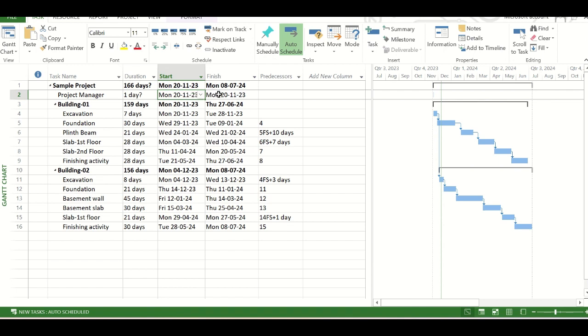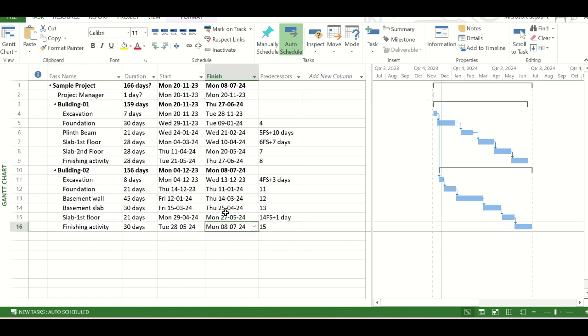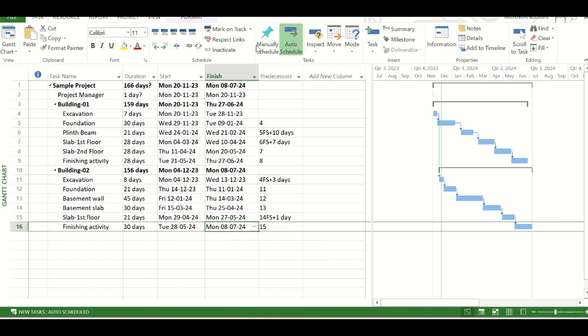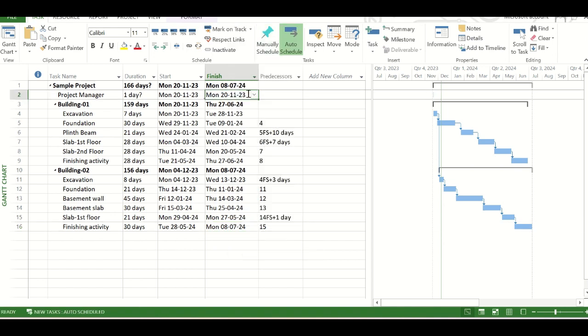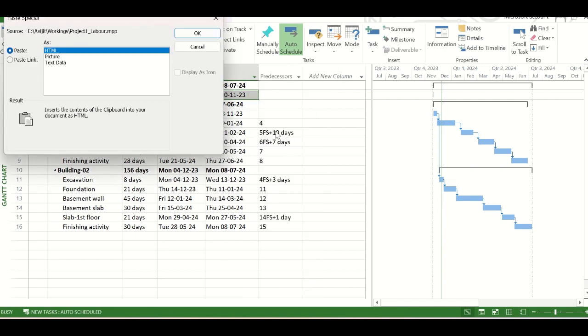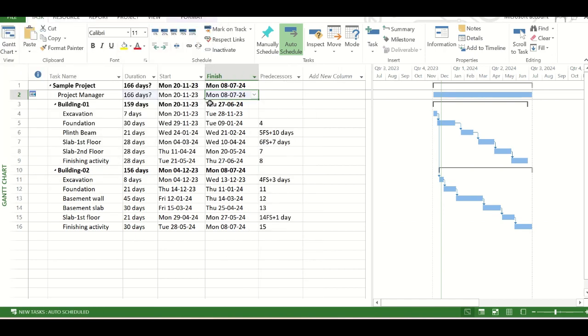And now we will link the finish date of the hammock task. Now the finish date of the hammock task will be dependent on the finishing activity of the building 2. So we will go to that, right-click on it, copy the cell, then come back to the hammock task, right-click on it, again click paste special and click on paste link and click on OK. So now you see, the project manager task is having a duration that we have not provided. But this duration is based on the start date and finish date linking with the other tasks. Now this is our hammock task, the project manager.